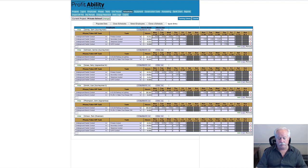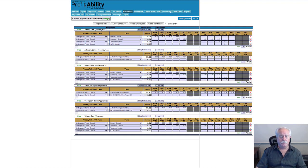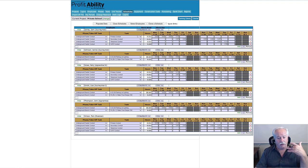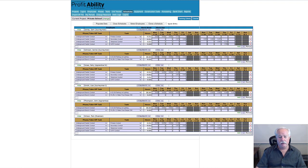The schedule is just a guide to the order you'd prefer they work on the project. They should stick to it as close as possible based on material, manpower, and equipment. If there's a problem on a task, give them permission to jump to the next one and work on that until the problem is solved, then go back to it.